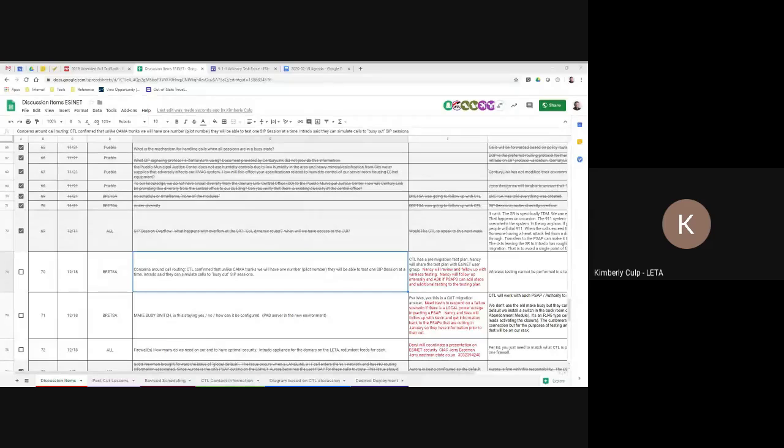Kevin, if I can also jump in, this is Kimberly. Yes. There were also 2-digit star codes for speed dials for 10-digit numbers to reach different agencies. For example, State Patrol had a 2-digit star code. I mean, there were just random ones throughout the state, and they are definitely legacy. So all the PSAPs, everyone should go through your contacts and get them updated if you still have them. I think we went through that process in 2011 when we were doing some CPE configurations and found a handful of 2-digit star codes still in use.